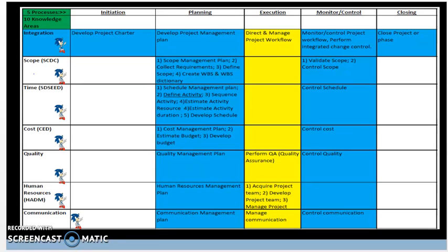range. Next, we have budgetary estimate, which is negative 10 to plus 12.5% at the control account level of the WBS, and is not as accurate, but it is easier to do. So all top-down estimates are not accurate, but easy to do based on data that we have.